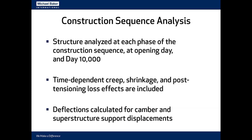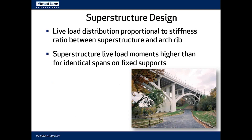Since this bridge is made of precast segments that are sequentially erected and post-tensioned, we needed to include time-dependent creep, shrinkage, and post-tensioning loss effects in our modeling for final stress states and geometry control. The structure was analyzed in each phase of the construction sequence, at opening day, and after creep and shrinkage effects had dissipated at day 10,000.